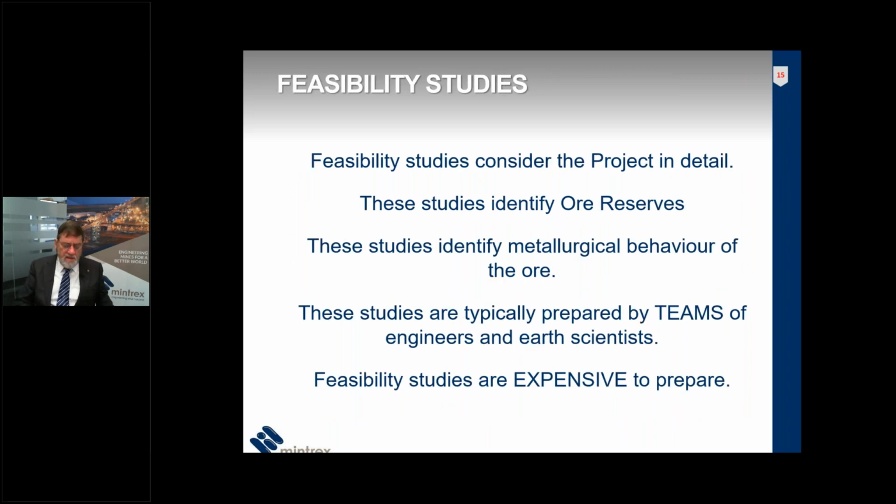Feasibility studies identify the optimised mining boundaries, pit shells, underground mine extents of the extractable reserves. They identify all the modifying factors to establish those reserves. They identify metallurgical behaviour of the ore based on representative samples of the ore domains. These studies identify cost and time duration to establish the mine and associated infrastructure required to present a product to market.